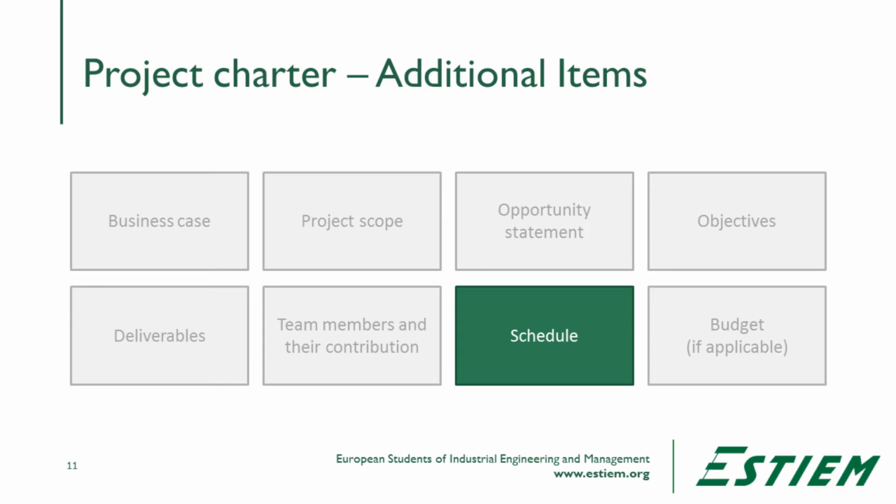Finally, as you do this charter, we realize that some of these things we can't actually write right away at the define phase. So the project charter at this beginning is sort of like a rough cut charter. It's not all of the details, but it's enough of them to say, let's get started. When we get to the analyze phase, it should be pretty complete. By then we should know the benefits expected. We should be able to say what the goal statement is and have a much better idea in terms of the schedule for performance of the project.